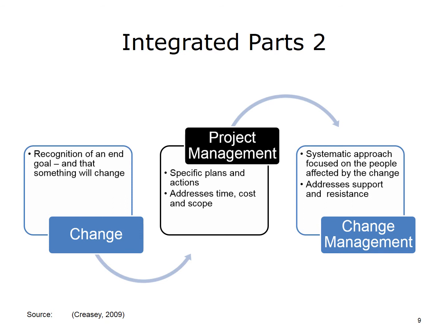In our example of the clinical decision support system, the goal of project management might be to develop a plan for getting the necessary hardware and software installed, the drug interaction rules designed, the system tested to make sure it works properly, and the plan for where, in what sequence, and on what timeline it will go live.